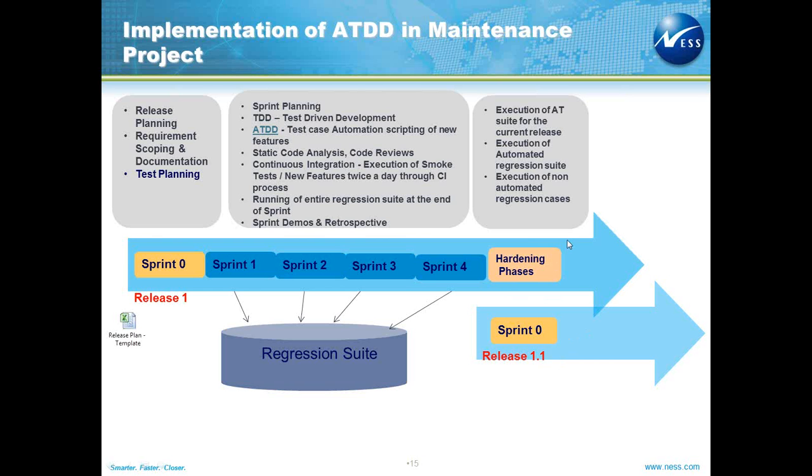So the developers are not free in this particular period, but they actually start with the requirement analysis of the other release. And since testers test this and complete the testing well in advance, they also move to the sprint 0. And this has enabled us to actually release the product faster to the market.